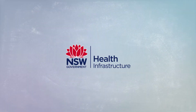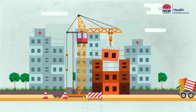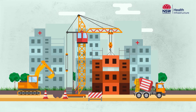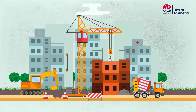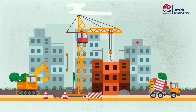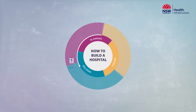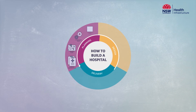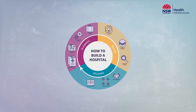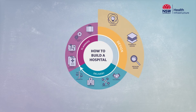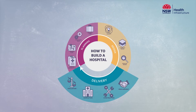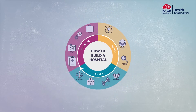Here at Health Infrastructure, we manage the Capital Works Program for NSW Health, overseeing health service redevelopments valued at $10 million and above. Every redevelopment undergoes three distinct phases – planning, design and delivery. This comprehensive process ensures our redevelopments meet the future health needs of the local community and staff.